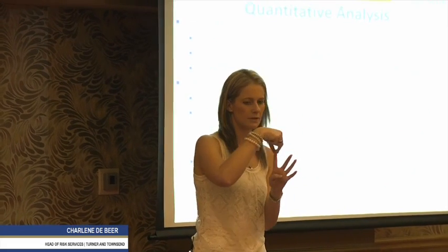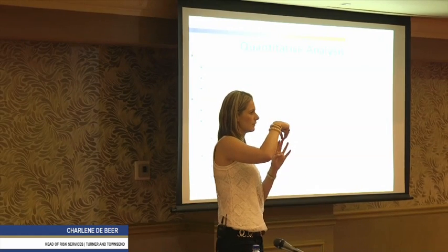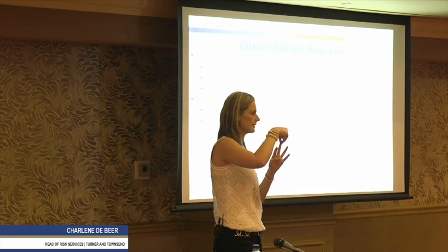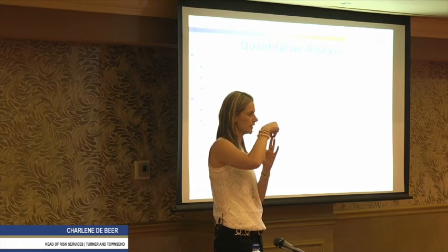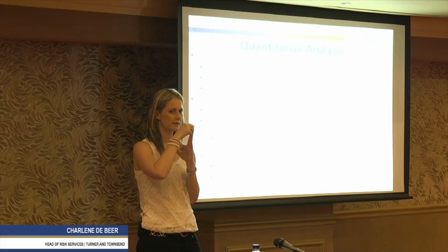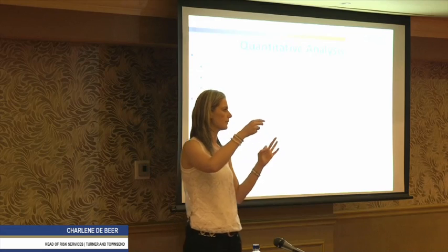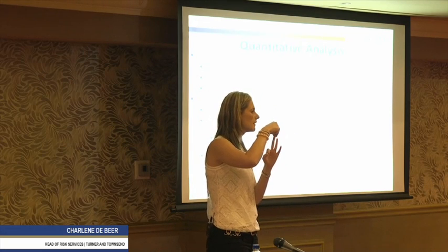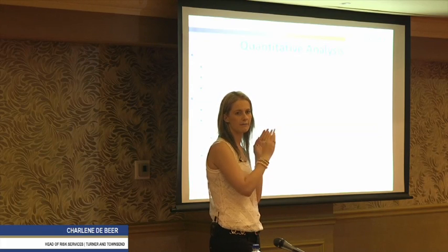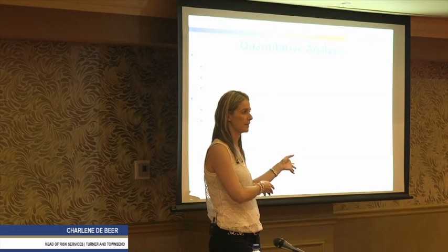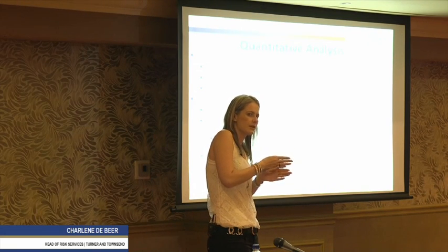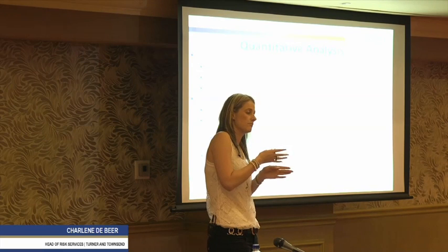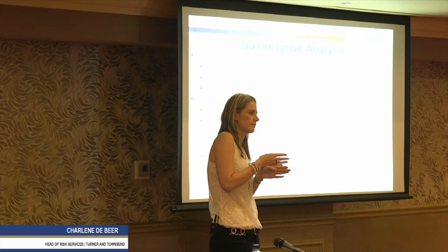So what the simulation will do is it will say for every week, and let's say we've said most likely 3 weeks will be delayed. So it's simple math. You'll say 3 weeks multiplied by R1 million a week is a 3 million impact, right? On the 3 million impact, what's the likelihood of it happening? Well, let's say 50%, just to make the math easy. 50% chance of that happening. So it's only 1.5 million that we face, because we're not saying the risk is definitely going to happen. We just want to proportion it. And then on the 1.5 million, what percentage area is affected? And let's say we tell it 5%. Your impact is 75,000.